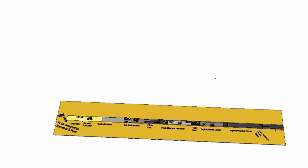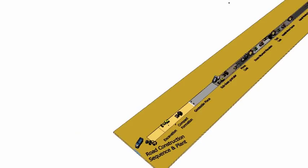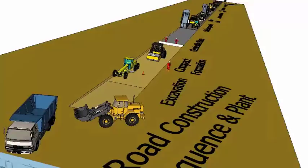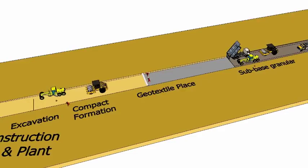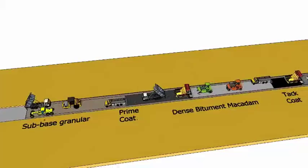Roads, Motorways and Bridges. Shown is the general construction sequence, methods, and equipment used to build a road: setting out, stripping vegetation, excavation, install underground utilities, granular sub-base, asphalt pavement, road markings, street lights, and signage. Earthworks include excavation, trenches, haulage, grading, backfilling, filling and compaction.